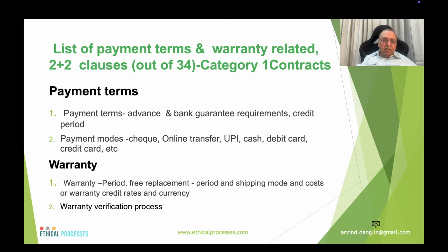Warranty related clauses: warranty period for free replacement, and shipping mode for getting the replacement, and costs thereof, who will bear that, and warranty credit rates in case there is no free replacement, and the currency thereof, and the warranty verification process to be followed.